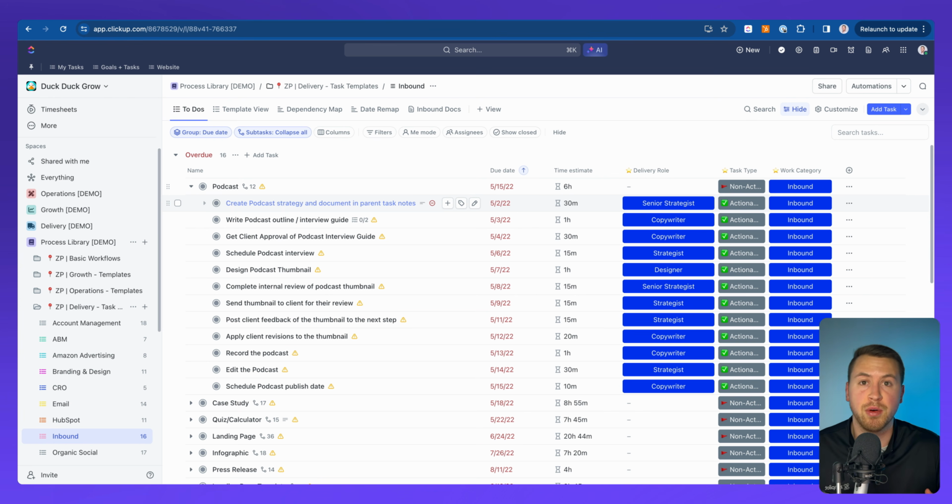That's how things just don't get done inside of ClickUp, because there's a little bit of that task closing anxiety to say, hey, I don't know if this person completed their part, so I can't close this task. And again, it just adds complexity to your workflow. So what you want is every task should be one person. We always say one user in one sitting, not to exceed a 4-hour time estimate.